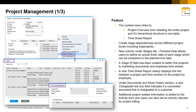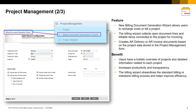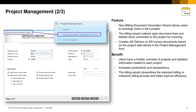Additional project related information is added to the activity form and users can also set an activity relevant for project billing. With regards to billing, a new Billing Document Generation Wizard allows users to recharge costs or bill a project. The Billing Wizard also collects open document lines and billable items connected to the project for invoicing. You can create an AR delivery or an AR invoice document based on the project data, and the Billing Wizard ultimately streamlines the standard billing or milestone billing process. You also have access to a Gantt chart via the context menu in the project window, which allows you to visualise a project as a whole, providing greater transparency and enhancing usability and productivity when working with projects in the system.